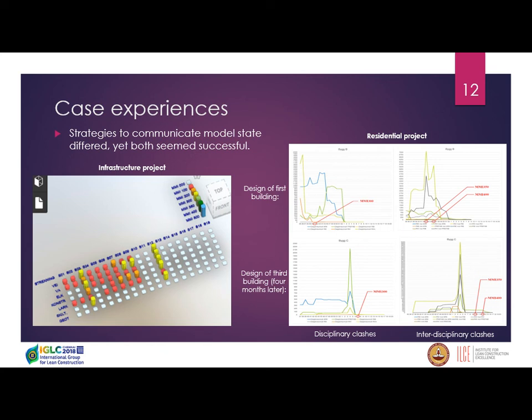So this pattern that you are seeing on the bottom here subsided for the succeeding 6 sections for this project, indicating that the designers, although they needed some time to grow accustomed to the system and weren't successful in meeting deadlines initially, managed to grow in their predictability in planning later on. And none of the MMI deliveries for the later stages were moved from the initial planning at the start of the project. So this obviously indicates that they were successful in their approaches.